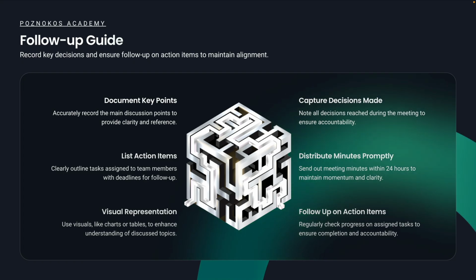I remember when I was a junior project manager, even the client, when I sent just action items, responded to me like, could you please provide deadlines? And it was a lesson learned for me, yeah, that stakeholders really require this information to understand and plan their part of the project.